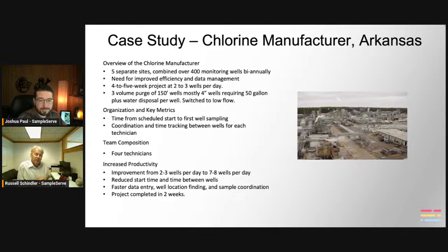We went in there and just proposed to do low flow, a perfectly acceptable work technique for sampling, because now the volume of water that they had to dispose of was a lot less. It took a little bit longer at first, but in most cases it was actually shorter because they stabilized, just like a normal well, in a relatively short amount of time. We went from those guys doing 2 to 3 wells per day down to doing 7 or 8 a day. And again, it was 5 separate projects.